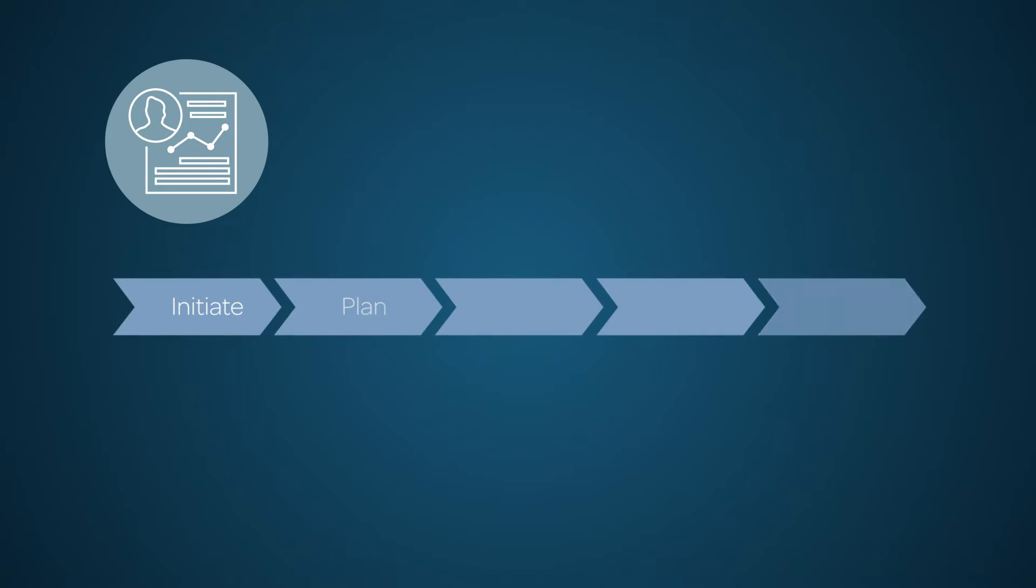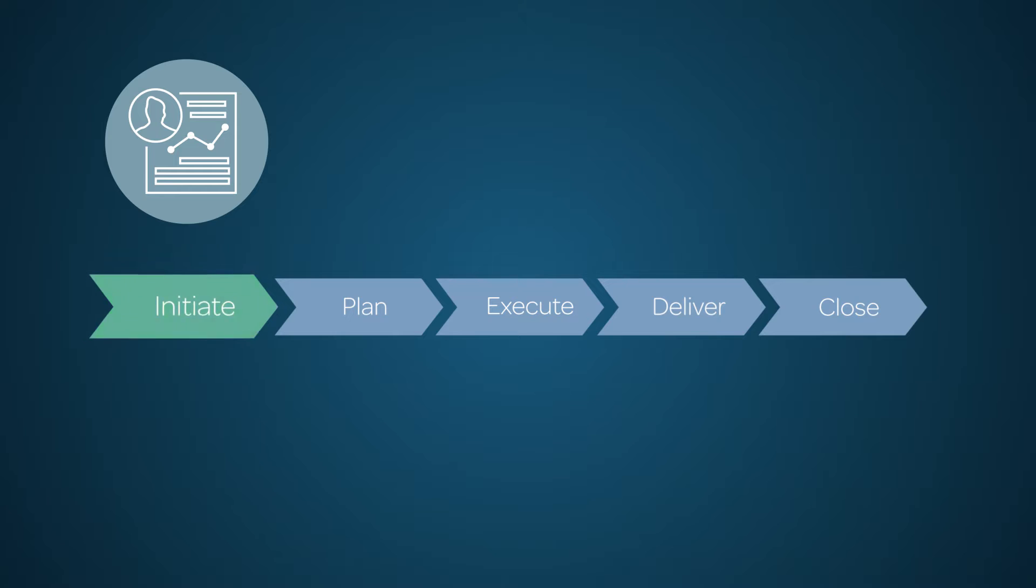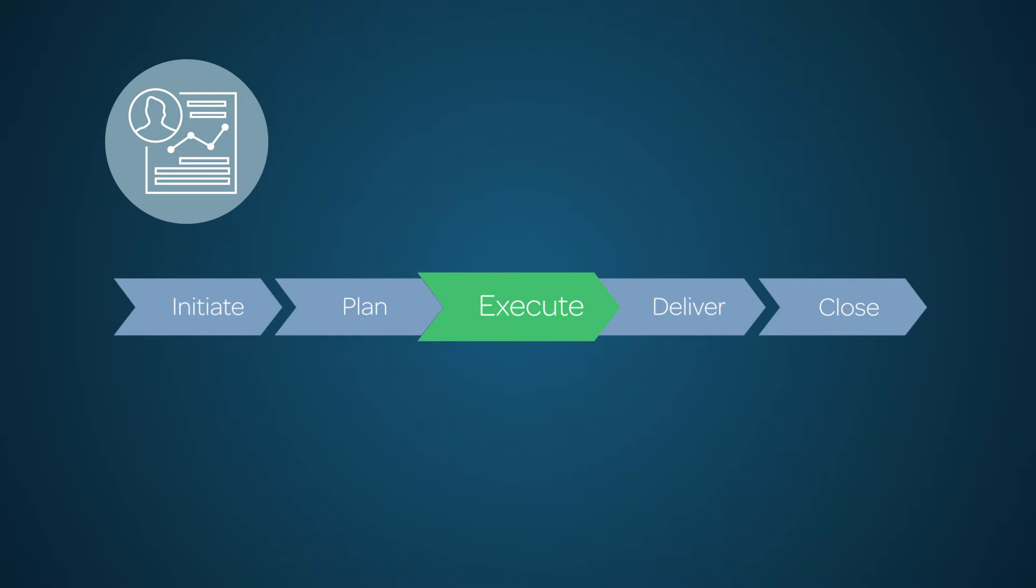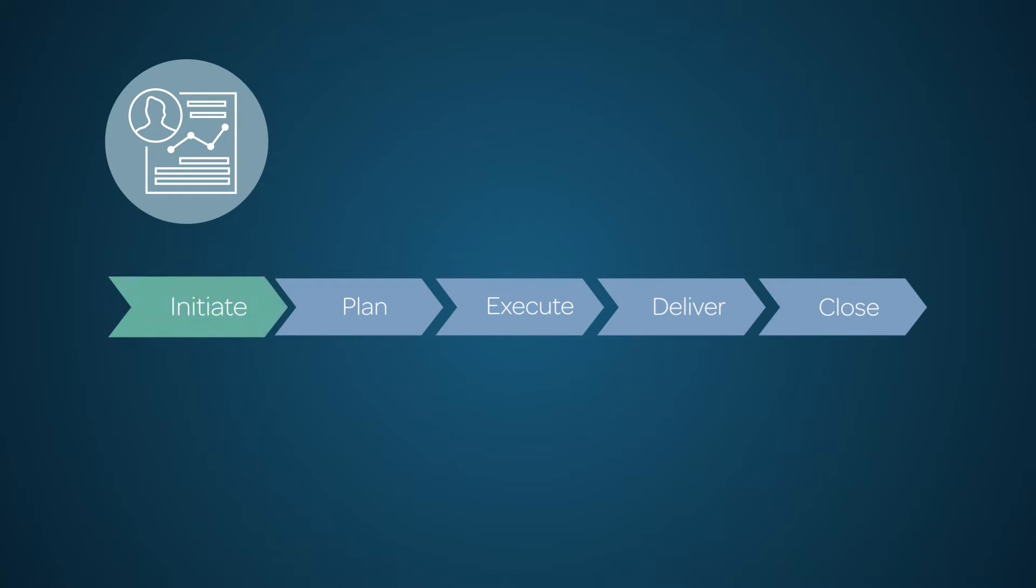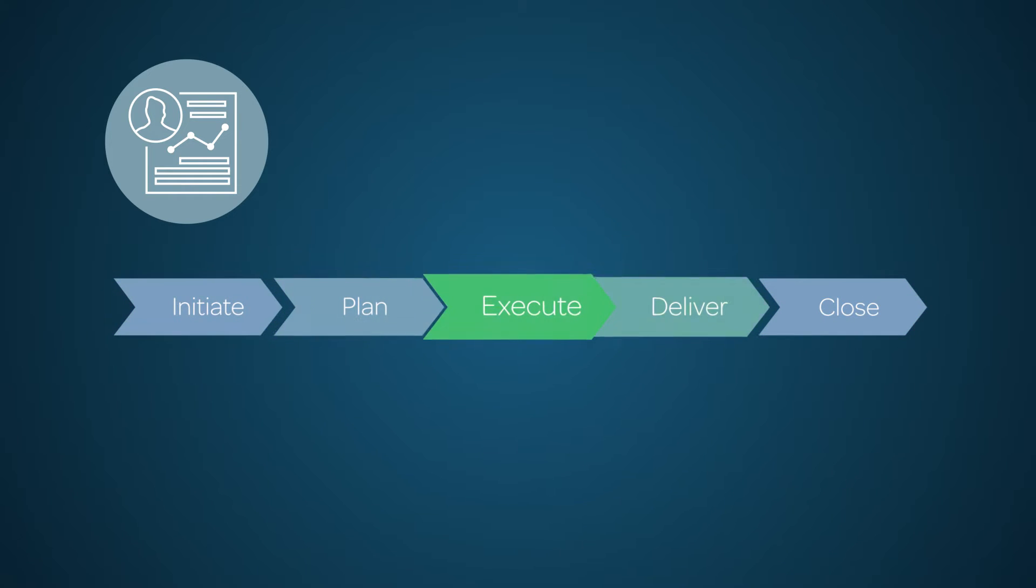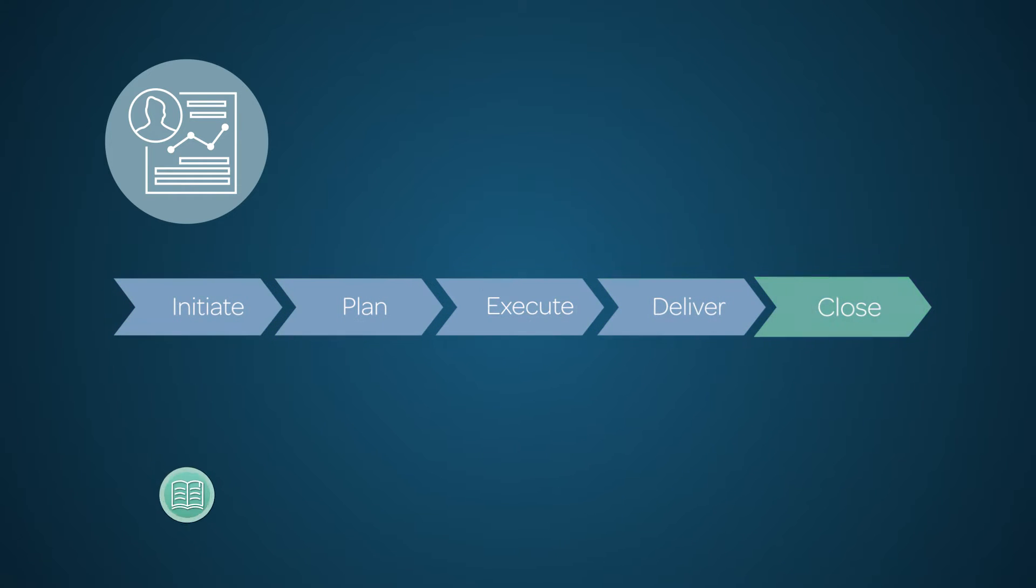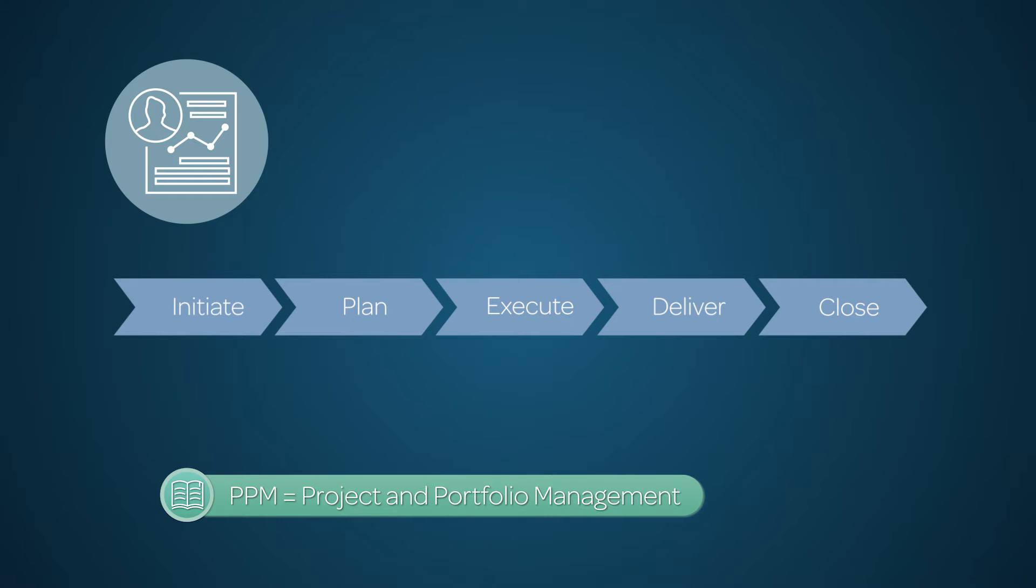Each project flows through a set of Project Management Industry accepted phases during its lifecycle: Initiate, Plan, Execute, Deliver, and Close. As with much in ServiceNow, these phases are configurable and can be adjusted to fit your PPM governance processes.